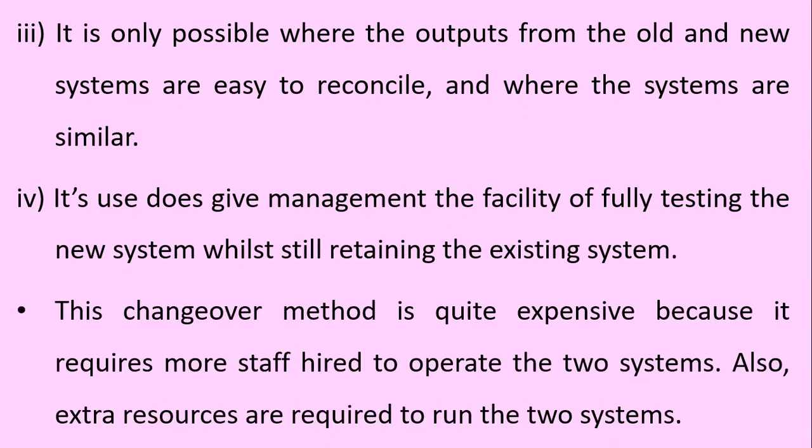This changeover method is quite expensive because it requires more staff to be hired in order to operate the two systems. That is, the staff to operate the new system as well as the staff to continue operating the old system. Also, extra resources are required to run the two systems.